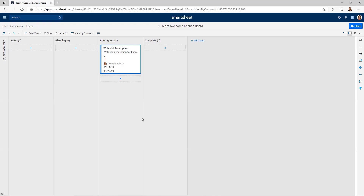This is a wonderful thing to include in your team meetings. As action items or tasks get assigned to people, just go ahead and assign it right then and there. Also, if you see that there's a lot of work piling up in the to-do column for one particular team member, you may want to check in with them — is there something going on, do they need help? It really does give you a nice visual of who's working on what. If you see something's due the 22nd and it's not even started and it's an extra large task, you're probably going to need to check in with that person or see if they need additional team members to help. This is how you create a Kanban board or task board in Smartsheet.